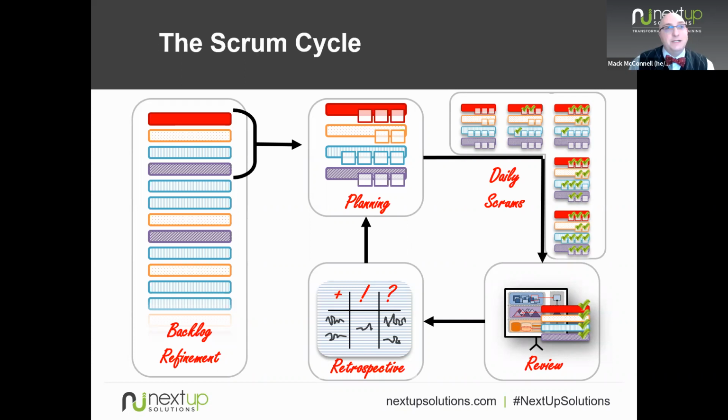And then they negotiate amongst the developers which tasks will have to be done to finish all of those things. So those are the 3 conversations that happen in sprint planning. They happen in that order. We call them the why, the what, and the how. Everybody's involved in the first 2. The third one is mostly just among the developers. By the end of that meeting, they have a very clear idea of what it is they're trying to accomplish.